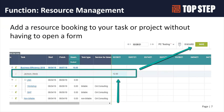With the Project Center overlaying the outline view, you can start to manage your bookings. You'll see what looks like a booking grid laid out on your project outline view. You are limited to weekly view as of today — it is hard-coded to weekly. You'll see the green Create button, and from there you can add resources at a project level, put in weekly amounts, set booking types, and once you've put all the information in, save the record to update the bookings on the back end.